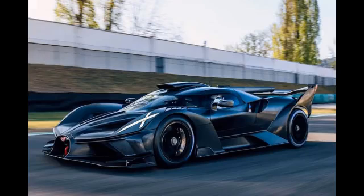Budget review at milestone. During the dyno test, Larry Jeffers Race Cars discovers the engine produces less horsepower than anticipated. They diagnose a faulty camshaft, affecting overall performance. Cost control action. Larry Jeffers Race Cars explore two options. Option 1, stay on budget, source a compatible standard camshaft within the remaining parts budget, $8,000. This might result in 5 horsepower less than the original target. Option 2, increased performance, upgrade to a high-performance camshaft for an additional $2,500, achieving the desired target horsepower.